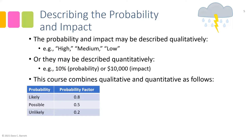This course combines aspects of qualitative and quantitative assessment. When estimating the probability, there are three qualitative categories: likely, possible, and unlikely. A factor is assigned to each — if the team selects likely, a probability factor of 0.8 is assigned; if possible, 0.5; and if unlikely, 0.2. It's important to note these probability factors are not percentages. So don't interpret likely as meaning 80% probability.